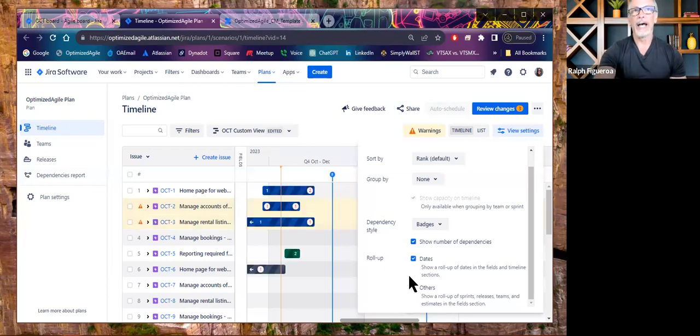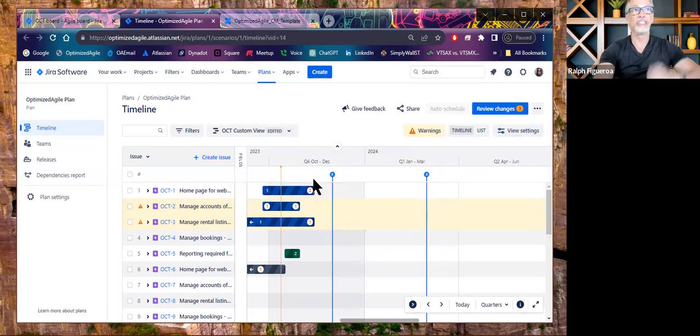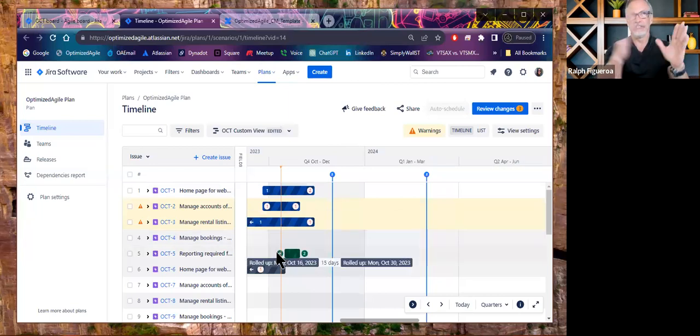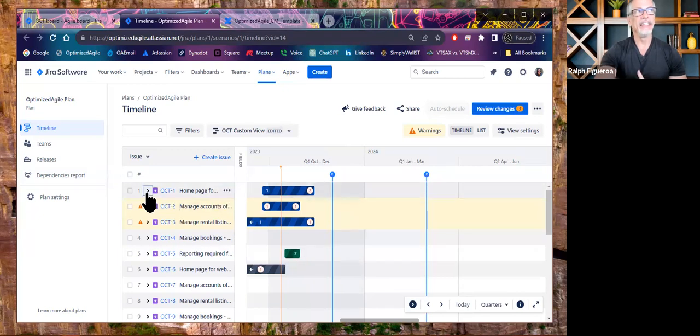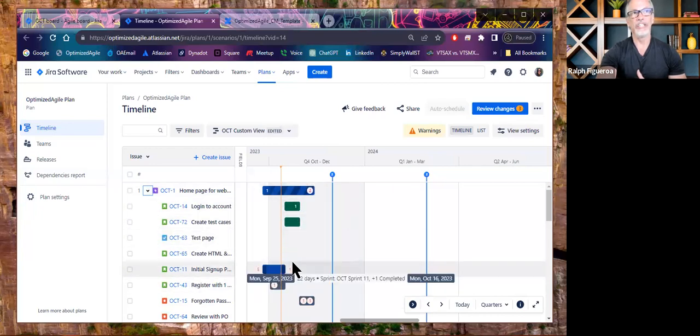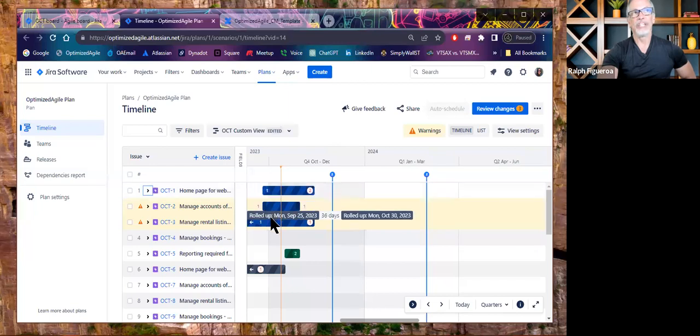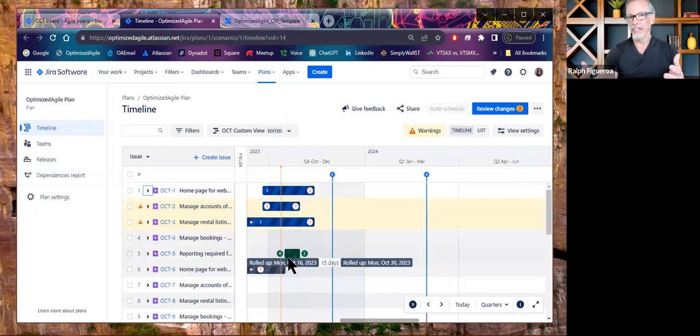So when I bring the rollup functionality, the tool is smart enough to grab that information from Jira. And as you can see when I click on the checkboxes, magically, these bar charts show up on my screen. And what it's telling me is that the stories that are underneath are mapped to sprints. And so it's using that information to drive the mapping of those progress bars, right? In my case, I'm selecting the progress bar to display the status of the epics underneath.